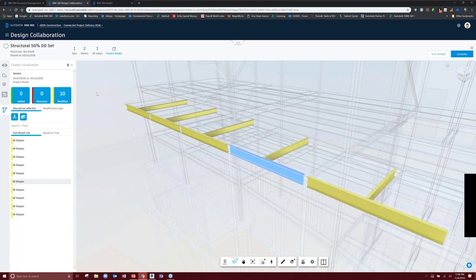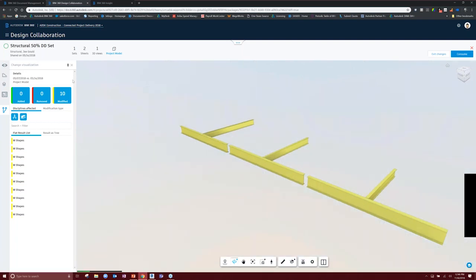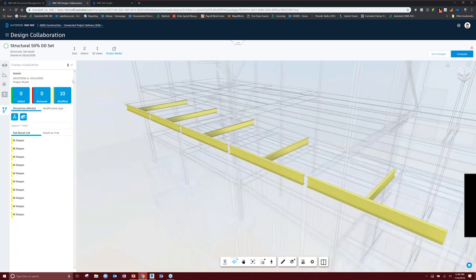The biggest question I get on here is, Joe, this is a really great feature. I love the graphics, but what happens when I want to track this out? You have the ability to also export this out into a CSV file. And then what I would recommend is if you're going to keep it in Excel, that's particularly fine. Go ahead and upload it to BIM 360 in project files in a folder you created called change management, with a date, so that you have not only the graphics here, but you also have the math behind it. Okay. So being proactive here gives you that pause opportunity.